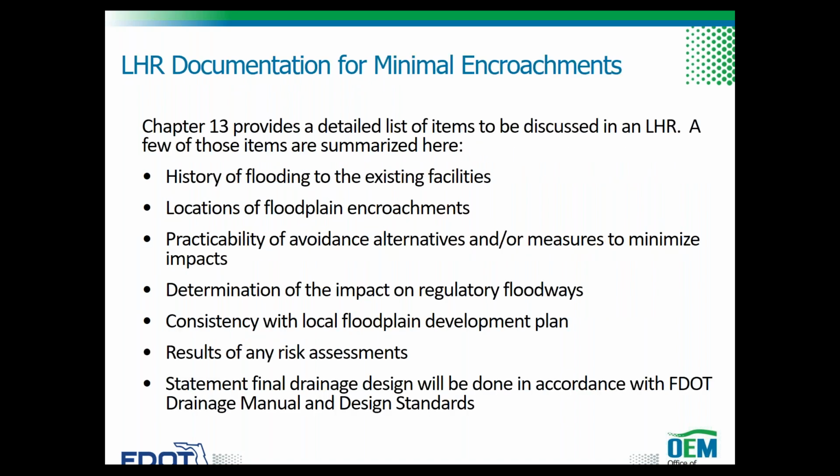Documentation for minimal encroachments is required and must include items shown in the chapter, such as project description, determination of whether the proposed action is in the base floodplain, impacts on the base floodplain, the likelihood of flood risk or overtopping, and location of the overtopping and the backwater. The documentation must also discuss any measures to minimize floodplain impacts associated with the project and measures to restore and preserve natural and beneficial floodplain values impacted by the project.